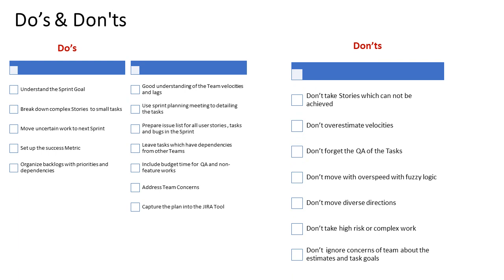On the flip side, some common don'ts include avoiding micromanagement, as it can undermine the self organizing nature of the Scrum team. It's also important not to neglect the importance of time boxing events. Exceeding the allocated time for meetings can lead to inefficiencies and loss of focus. Furthermore, teams should avoid making last minute changes to the sprint backlog during a sprint, as this can disrupt progress and affect the quality of the deliverables. By following these guidelines, teams can maximize the benefit of Scrum, fostering a productive and adaptive work environment.